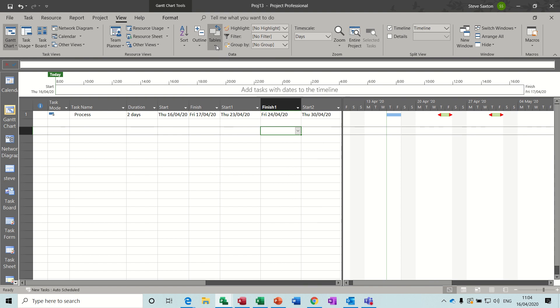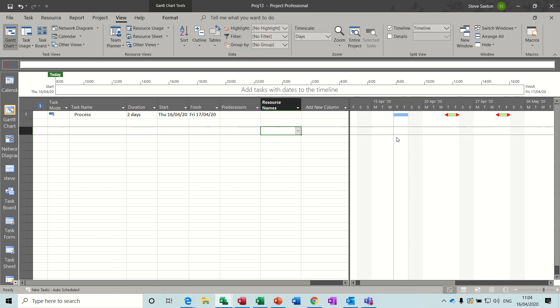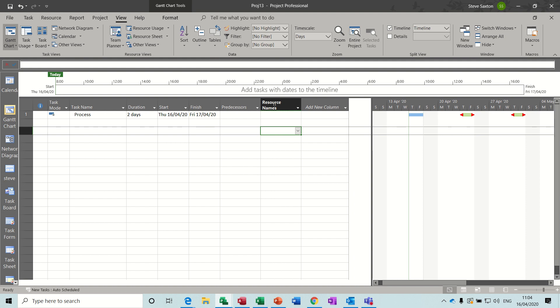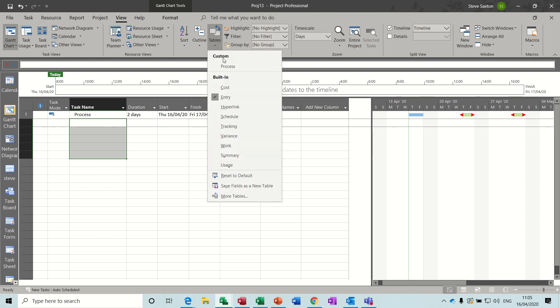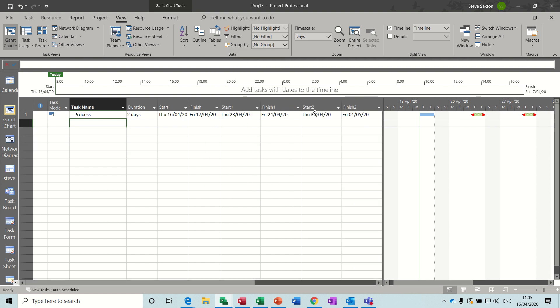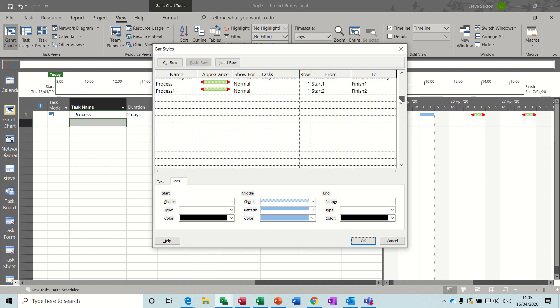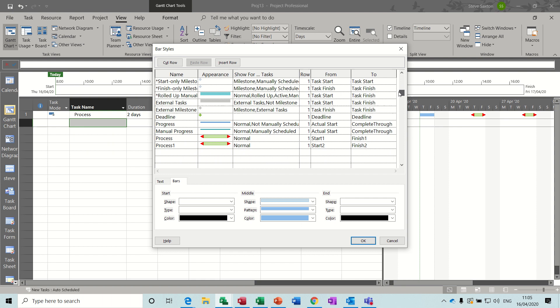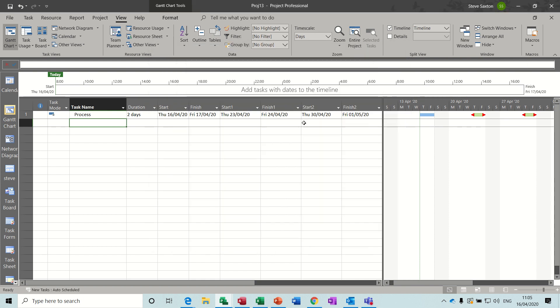So there is entry and then you've got process. You need process to actually populate if you've got other similar sort of tasks coming down there, you would need the process table on so you could fill in the relevant dates. And if you need more repeating tasks like that on the same line, you would have to create additional lines down here and then you would need to insert the columns if you wanted more repeats.